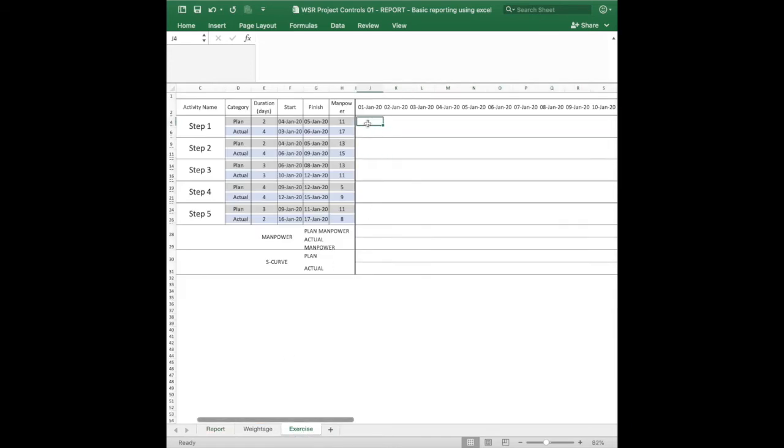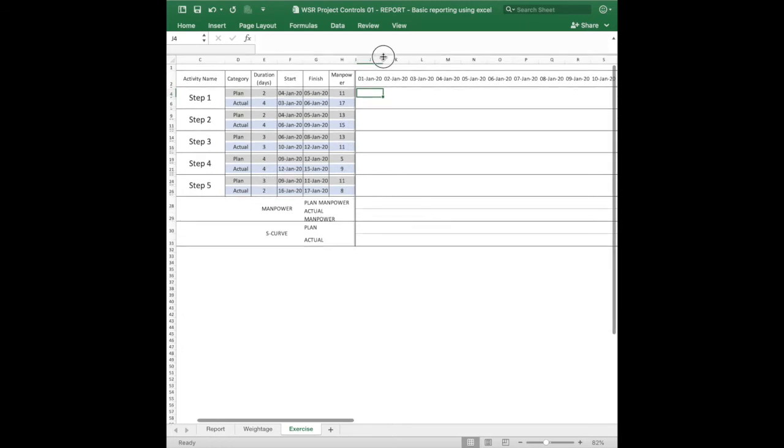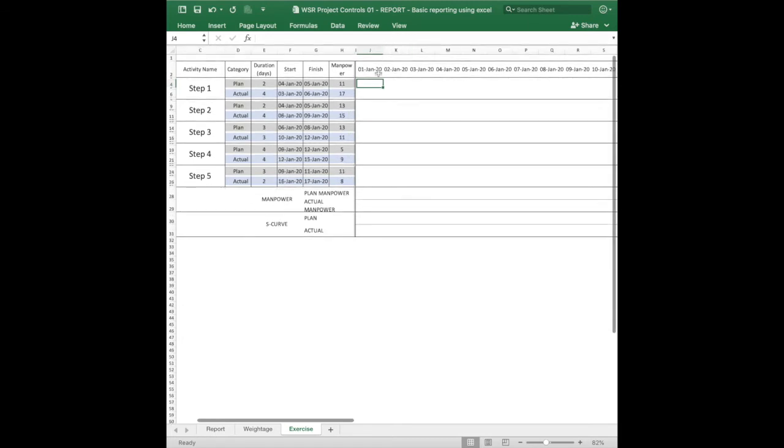So like what I mentioned earlier, that we did the formulas using the if conditions, right? Okay, so now let's do the first condition. If our timeline is less than our start date, then 0, else 1. Let me just lock the timeline to row number 2 and the start date to column F. I'm pressing F4 by the way. Enter. Copy and yeah. So this is what we're expecting.